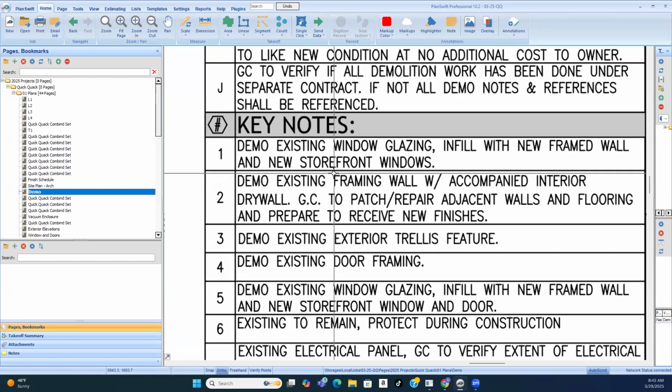Now I'm also going to input a part for the new concrete and show you what is involved in that. Because when you cut out reinforced concrete, reinforced concrete has reinforcement in it, so you're cutting that out. That's a bigger cost. It's more expensive to cut out, whether it's mesh or rebar. Of course, it's going to cost them more for you to cut that out. But then when you put it back, you have to incorporate the rebar back into where you cut it out. So you're not only installing the concrete, you're installing rebar.